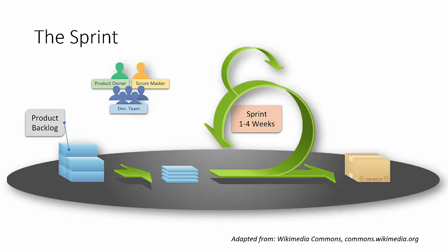So the team then needs to decide what it is out of the product backlog that they will be performing in each iteration. This is what we call the pull mechanism. And so the team will pull from the product backlog into the sprint backlog those elements that from the top of the product backlog will be performed in the upcoming sprint.